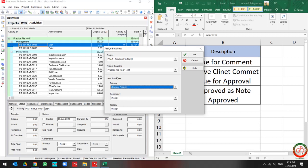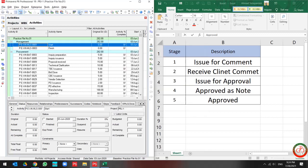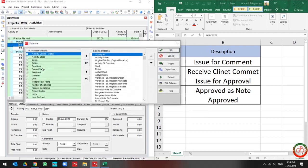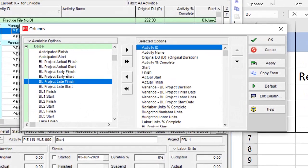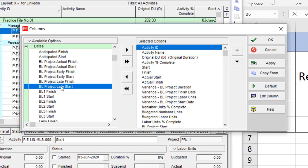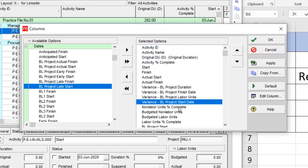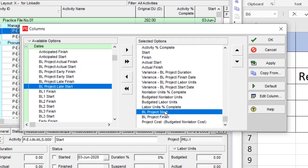The first one is the project baseline. You have more information about it in your fields, but the primary, secondary, and tertiary baselines have less information. For instance, if I want to have a look at the dates for each baseline, I can find out I have baseline project late finish, late start, baseline start, and baseline finish over here, and I have late and early as well.